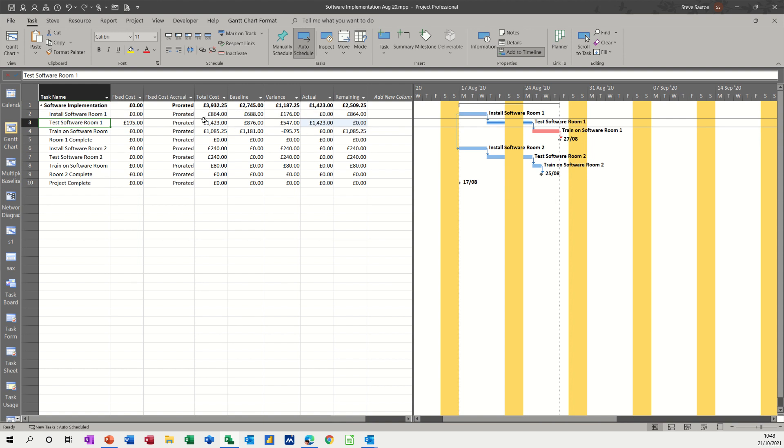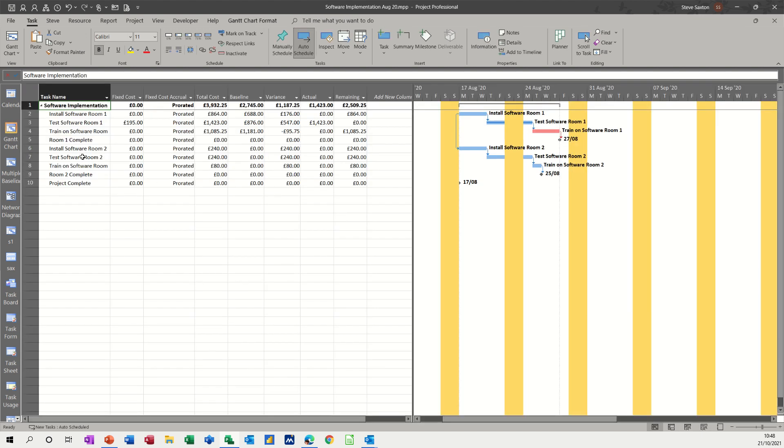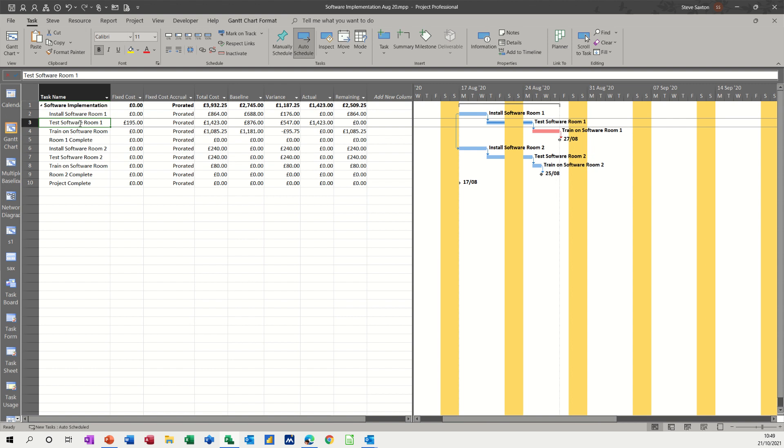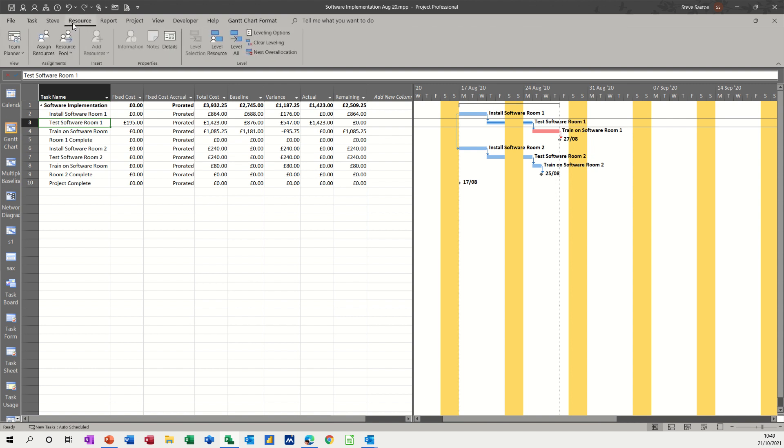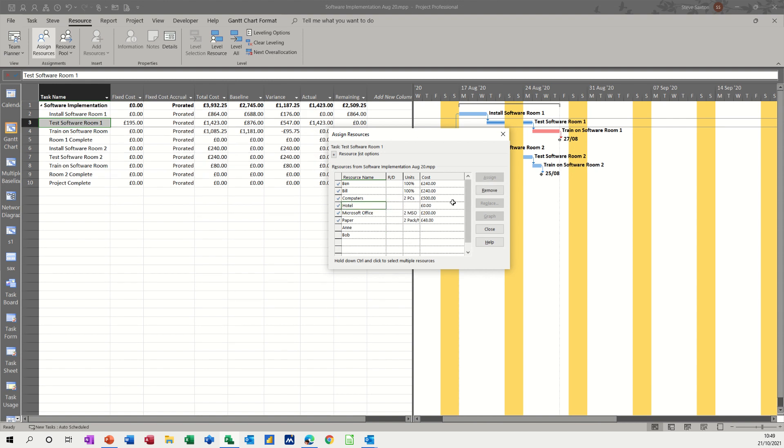Now, if I add a cost, if I go back into the resource sheet, I've got a hotel cost there. So you don't actually put a cost in the resource sheet, you just add it when you're allocating the task. So if I go into that one, resources, assign resources, and add the hotel, assign. And then you put the price in there, so I'll put £150.